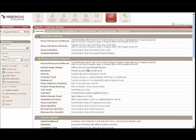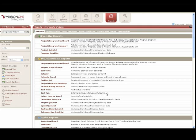If you just have one person in every state, we start adding people to those states to increase bandwidth or decrease latency — our latency goes down and we get more done over time. If we've got four concurrent pipelines or the ability to run four concurrent features, then 120 days divided by four gives us 30 days to complete. Very much like Agile, planning is a continuous activity — we plan all the time. It's always a what-if type of thing, and product owners sometimes make hard decisions about cutting features to make a date.